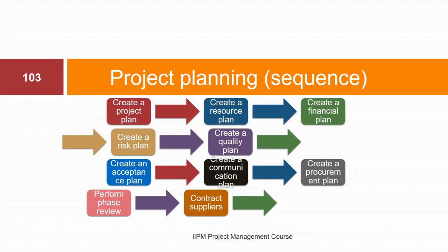But the best thing is create your project plan independently first. Then you create your resource plan using the project plan as an input, and then go ahead and create your financial plan using the project plan and the resource plan as input. And then you now move ahead to create your risk plan. Creating your risk plan, every other part of the plans, all other subsidiary plans, need to be carefully reviewed so as to identify the risks inside them.